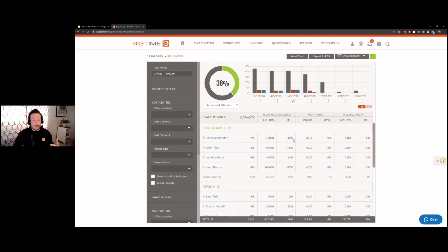You know, I probably wasn't doing a good enough job of looking ahead to see when I needed to pick up more projects. Of those 40 that he was assigned, he only input 8 of those. Again, that utilization based off the allocation is severely low. The good news is, of the 8 hours he tracked, 8 of those were billable hours, so billable utilization as well. So overhead view, however you need to group and sort and order this to keep an eye on capacity, allocated utilization, input utilization, and billable utilization.